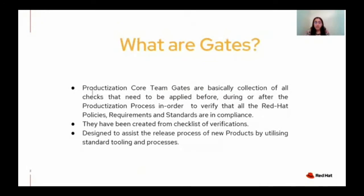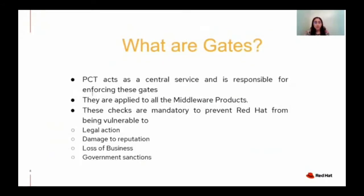These Gates Checks have been created from a checklist of verifications, and they are designed to assist the release process of any new product by utilizing some standard tools and processes. PCT, that is the productization core team, acts as a central service and is responsible for enforcing such Gates. Such Gates are applied to all middleware products and are mandatory to prevent Red Hat from being vulnerable to legal actions, damage to reputation, loss of business, or government sanctions. These Gates need to be run at least once before any customer-facing release, but it is helpful to run them as early as possible as they help in early identification of problems.